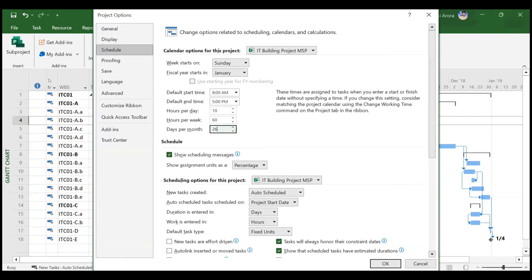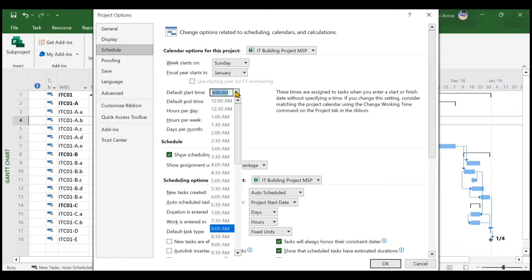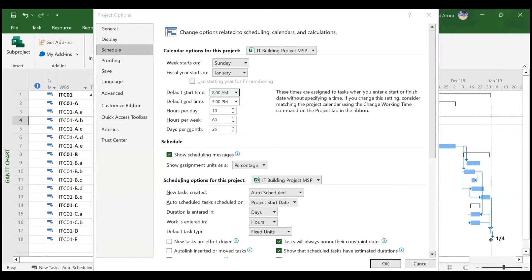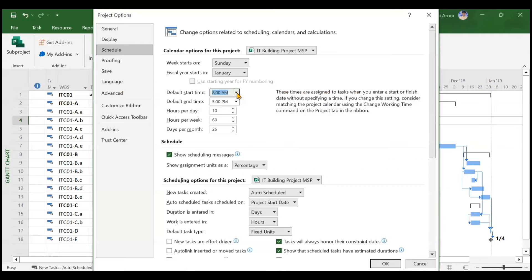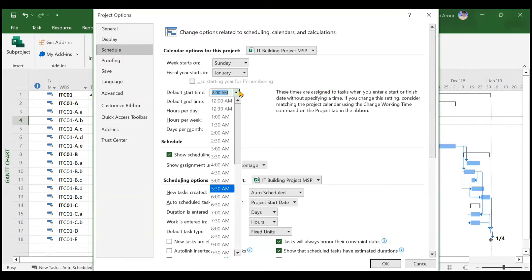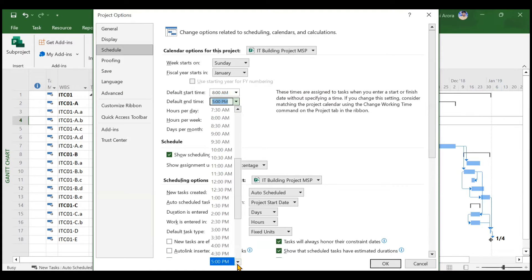In the Standard Calendar, work went Monday to Friday. Days per month — we are considering only four Sundays off, so approximately 26 days per month. If you assign a new calendar but do not change these settings, everything will not work properly. You also need to change the default start and end times. As per our IT Building Calendar, the site starts at 8 a.m. and ends at 7 p.m., so change the end time to 7 p.m.